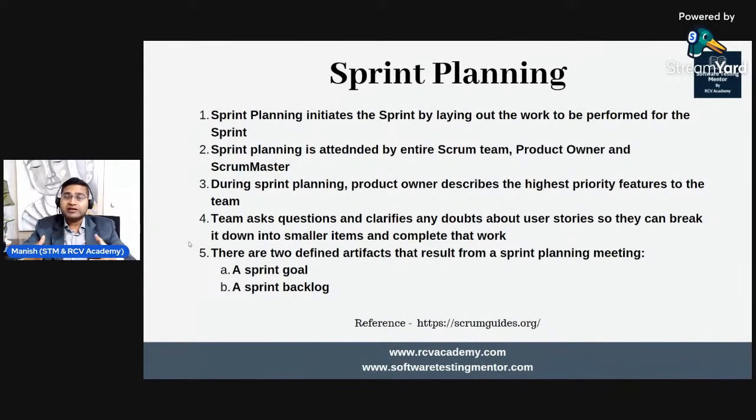Once those user stories are ready and can be deployed as a package, what is the sprint goal that needs to be defined? For example, if in this particular sprint we as a team have decided, because of the priority of the work items defined by the product owner, that the login module was highest, so we picked all the login module user stories because there was only a limited number of user stories that we can accommodate within this sprint.